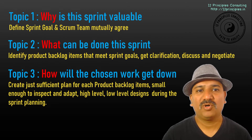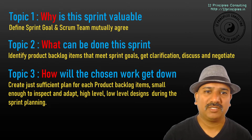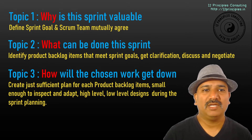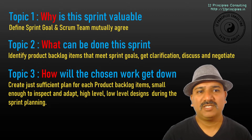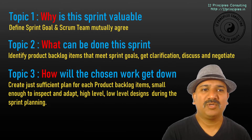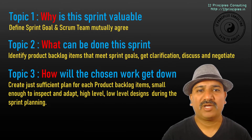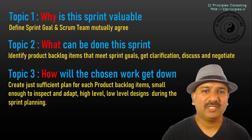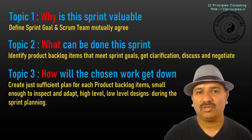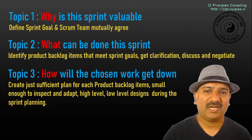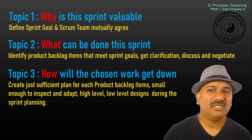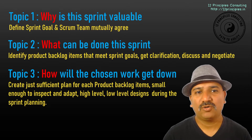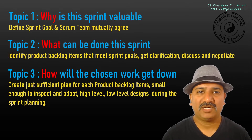In topic two, the team members discuss about what can be done during the Sprint. During this phase, the team members identify the Product Backlog items that meet the Sprint Goal, get clarifications, discuss, and negotiate as required.